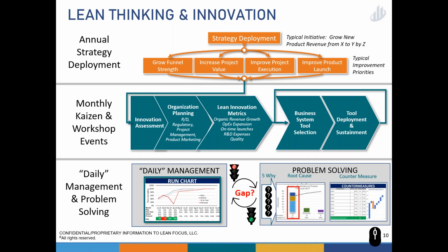And what we do is we make a hypothesis. So think scientifically, this is what we think is going to happen. I'm going to start to build this product. It's going to take 9 months. Okay, every week, let's measure. How are we doing towards that 9-month goal? When we get off track, that's when we need problem solving. So think about daily management as tracking. Are the actual results following my hypothesis? And problem solving is what you do when the answer to that is no. You stop, go back, figure out what didn't I understand, and that's how you learn.